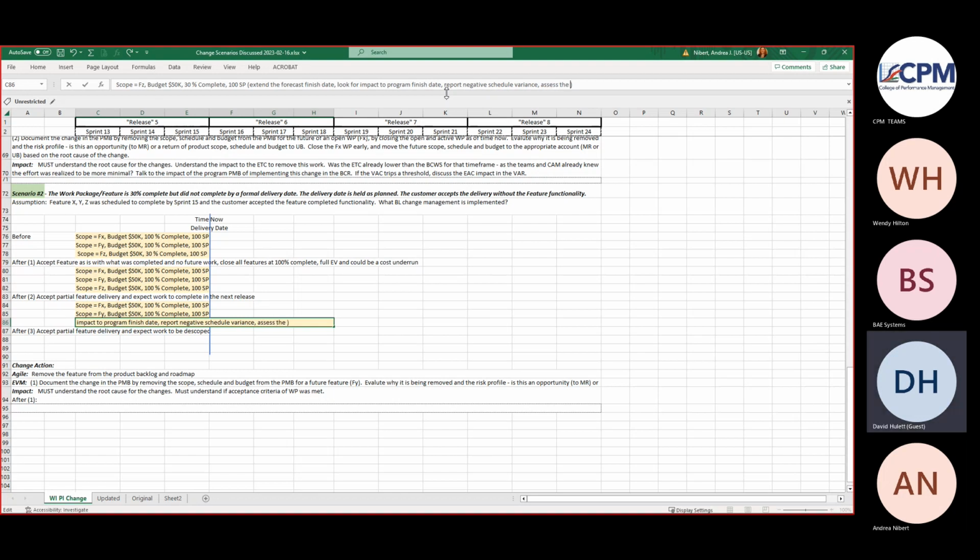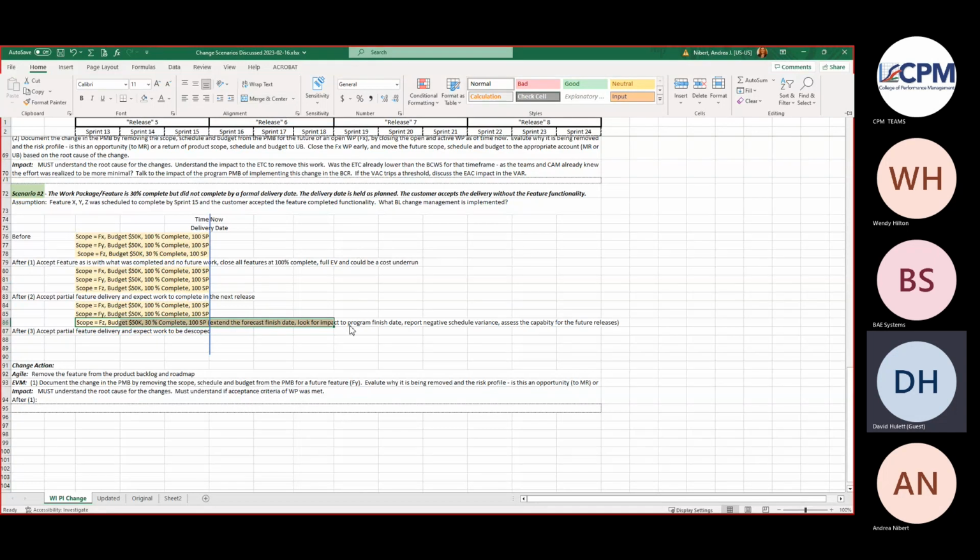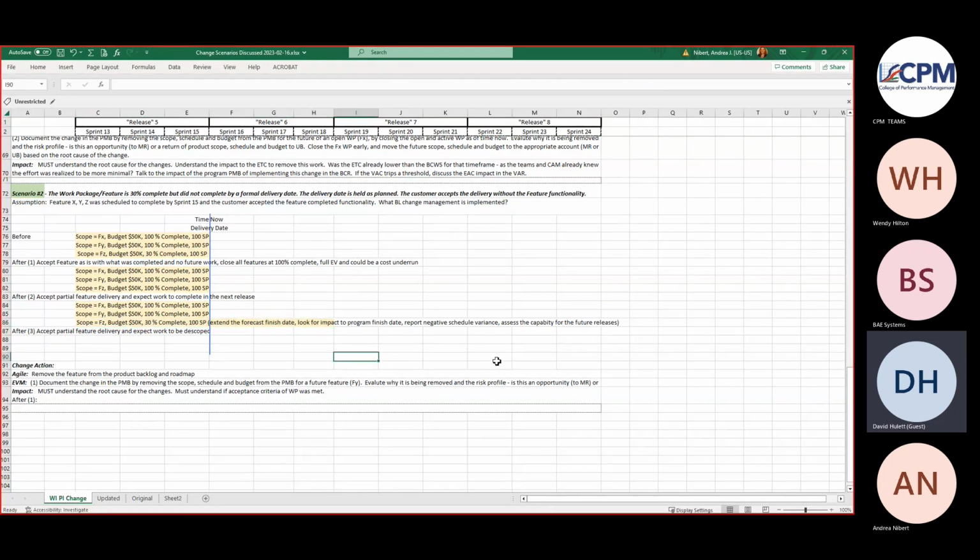I remember one commercial example of a software development where they said, "By God, we are holding to our milestones," and they absolutely were. Those milestones were just never changed, but they didn't produce anything, or they produced very little, and so the features kept getting forwarded to the next milestone and forward to the next milestone. Pretty soon they had 2 or 3 times the number of features they could possibly do in the next milestone. They were just never going to make it. And that was that. We don't want to have an answer which would permit that, I don't think.